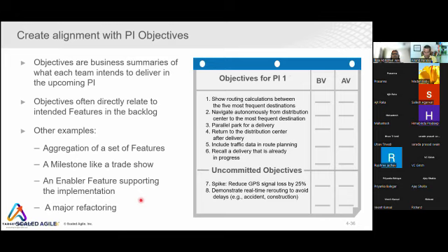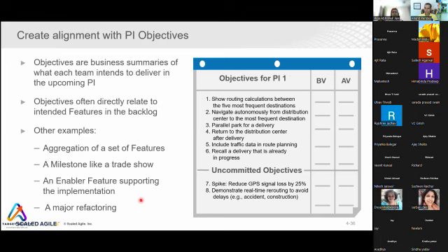So does it not hamper the continuous delivery to the customer? See, if you have to do innovation, you need time and space for it. You can't expect people to innovate while they are also working and delivering, and then ask them why they don't innovate. Innovation needs time and space. You also have to provide the guard band so that your PI planning happens at the same time every 3 months.